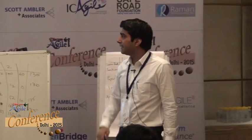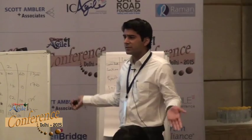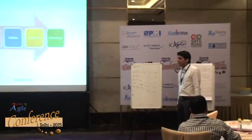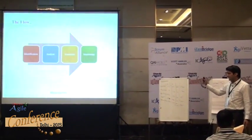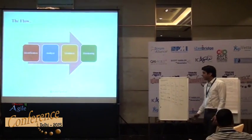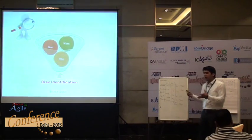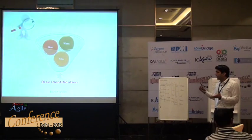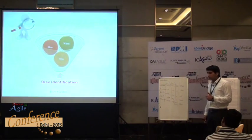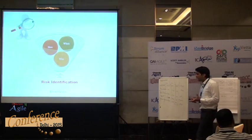This is the flow — the most simple flow in the world. We identify something, we analyze it, we treat it, and we monitor it. I kept it as in the traditional method and didn't play much with it. When it comes to the risk identification part, there are three things: when, how, and who. How do we identify risk? When do we identify risk? And who does that?